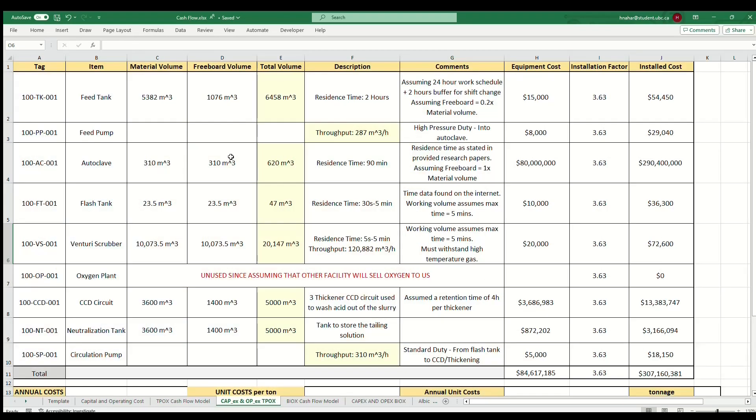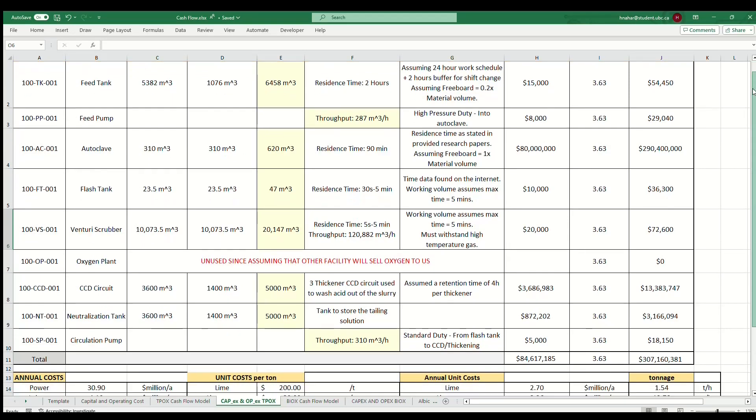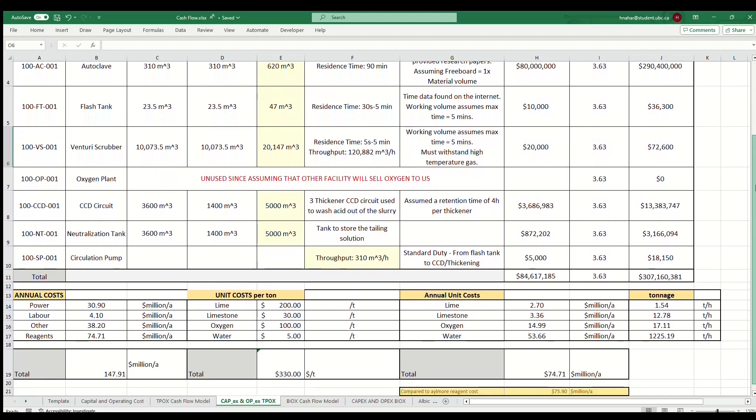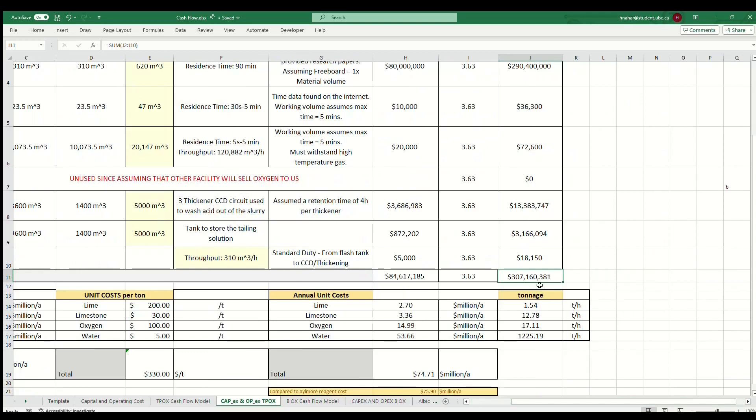This brings us to project cost estimation. Now that we have flow rates from the mass balance, we can use these to determine cost. An equipment list can be created. Mass flow rate determines equipment sizing, which is then used to determine capital cost.